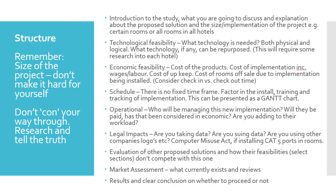Scheduling — there is no fixed timeframe. You need to factor in install, training, and tracking of implementation, and this can be presented in a Gantt chart. Consider order time, shipping time, and getting items into the UK. We've seen over the last year, especially with COVID and Brexit, that ordering from the continent and further afield is really problematic. You want everything installed within six months so you can get a good dataset from measuring success. If it goes beyond six months, the original installations may need replacing or start showing issues, making data obscure and difficult to track.